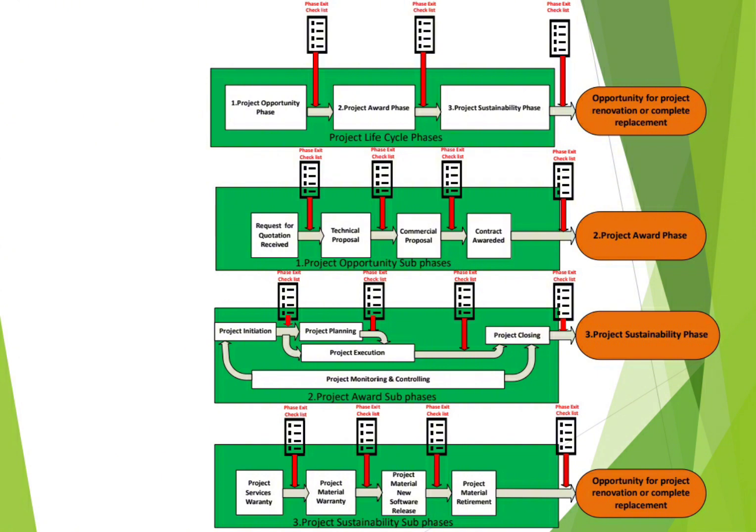So once this internal kickoff meeting is completed, your team, the technical team, need to start to prepare their prerequisites so that they can start the project execution phase, so that they can start the design activities. So this list of prerequisites needs to be shared with customers.